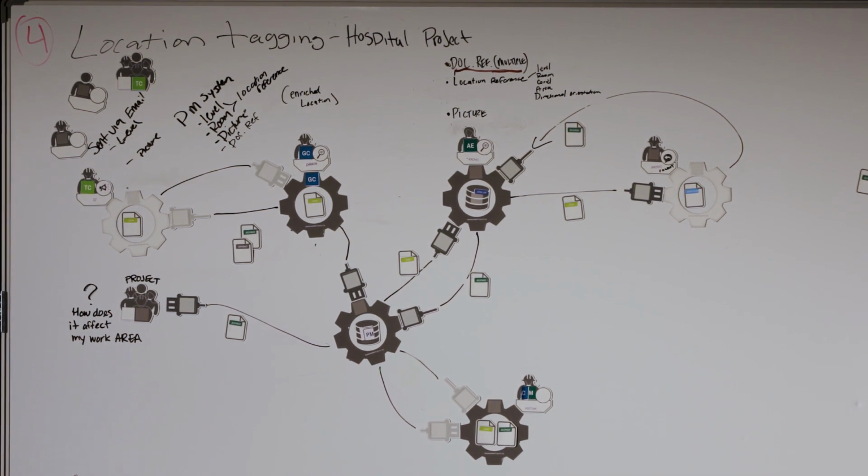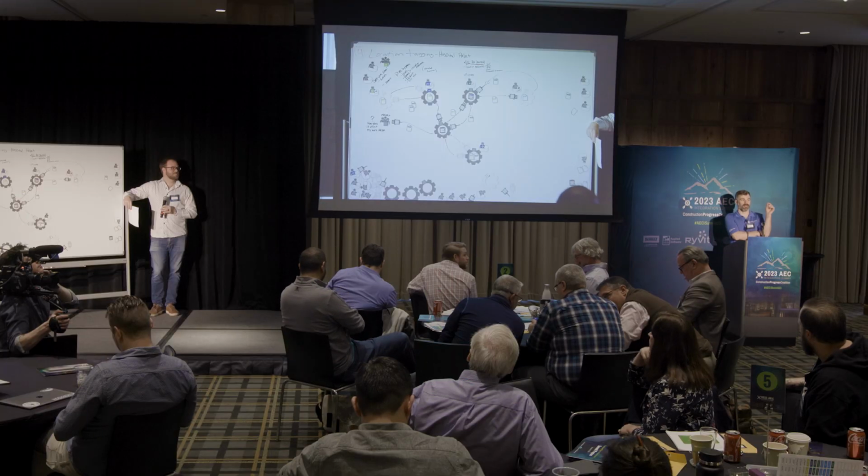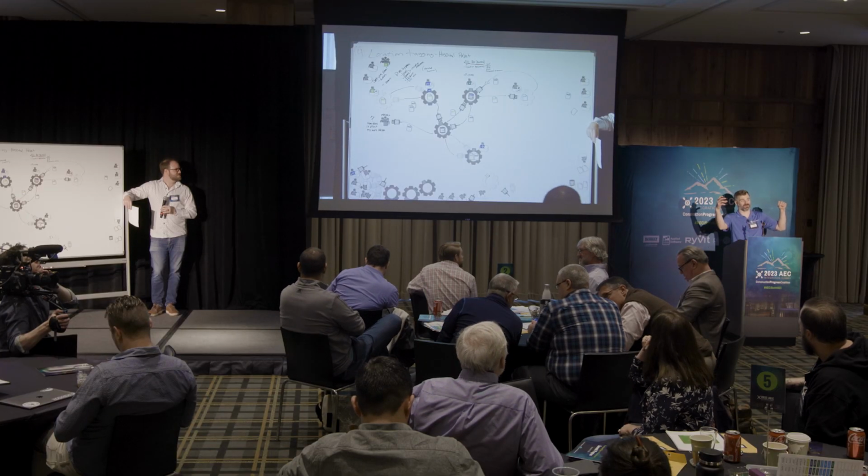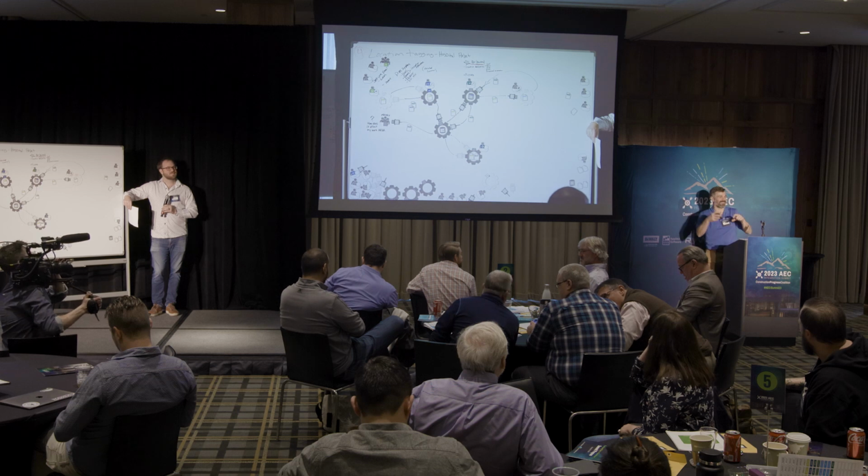But that opens up the possibility for you to actually red zone areas and say if there's anything happening in this area, we should pay special attention to it, and then you can start to flag things that might be considerations that the AHJ would be concerned about, certain encroachments or conditions of spatial requirements, things like that. Codification would allow you to do that analysis that is now left to us to manually investigate, which is why that pain or job security, I don't know. But it's the intersection of an RFI location with a hotspot boundary. Like anytime the RFI enters that hotspot boundary, it does.